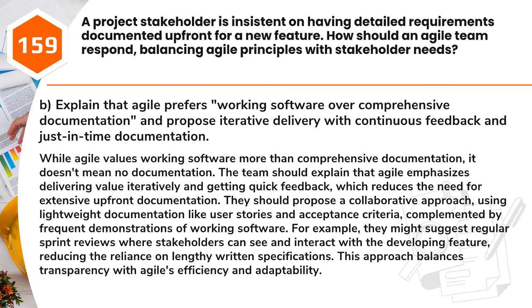demonstrations of working software. For example, they might suggest regular sprint reviews where stakeholders can see and interact with the developing feature, reducing the reliance on lengthy written specifications. This approach balances transparency with Agile sufficiency and adaptability.